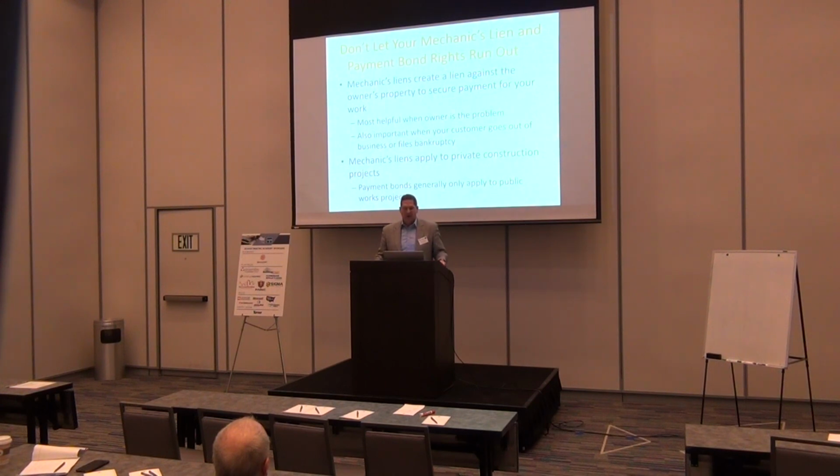And in that case, all the subcontractors got paid, and the general contractor had to go slug it out with the owner. And we won, but the advantage for the general contractor was he didn't have a $3 million receivable with all his subcontractors. He just fought over his portion of it. And so it was a little bit more manageable. So that was very helpful in that case.